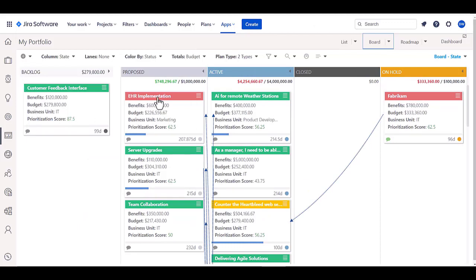I can even have different limits like budgets or story points, or even work in process or WIP limits up here to understand when I've exceeded those at the top level here, when I'm actually doing my planning and determining what things I can work on next.